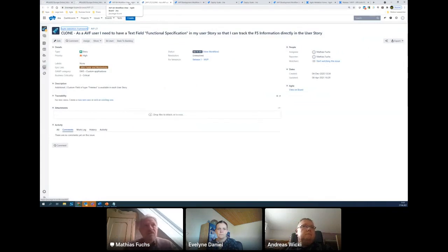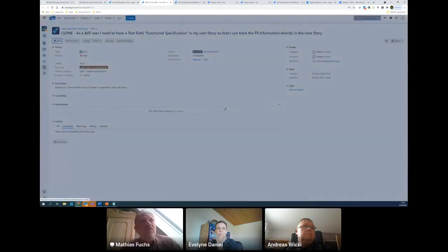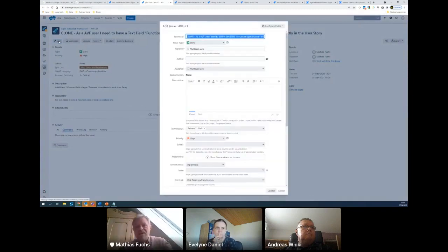That could very well be, okay, now we're here. That could very well also be a link that says blocks or depends on. Then we could link different user stories with each other. And then you see it in the traceability matrix, how everything is. Of course, one nice thing would be to have a dependency map, which is possible in Jira. We just haven't implemented it for the MVP at the moment. But a dependency map would graphically show you the dependencies of all these objects.